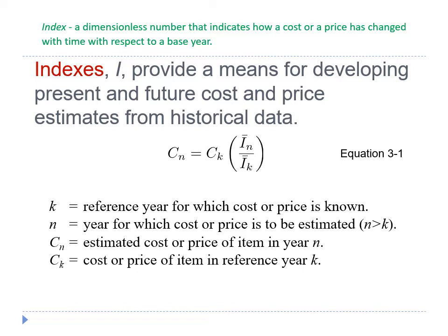This concept can be applied at the lower levels of a work breakdown structure to estimate the cost of equipment, materials, and labor, as well as at the top level of a work breakdown structure to estimate the total project cost of a new facility, bridge, and so on.